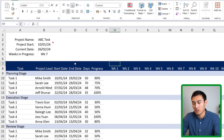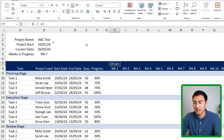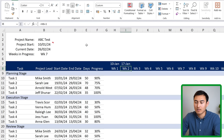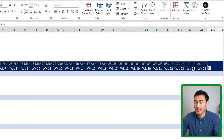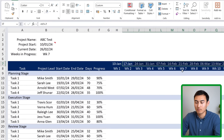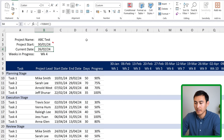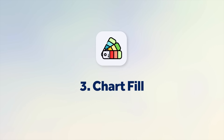Just above the week numbers, we add the actual dates: the first cell equals the project start date, and each subsequent cell is the previous date plus 7. Dragging this out to week 25 completes the date row. If we change the start date — say to January 30th — all the numbers update automatically. Let's revert that and move on to building the Gantt bars.